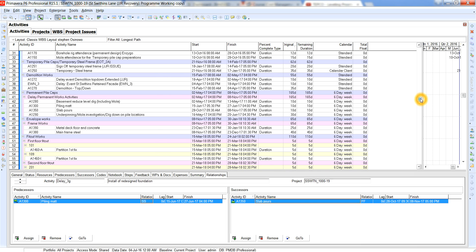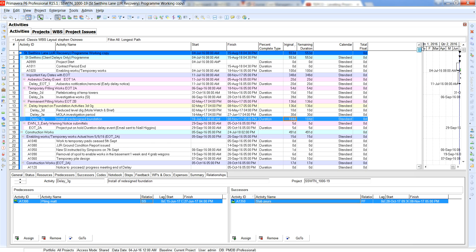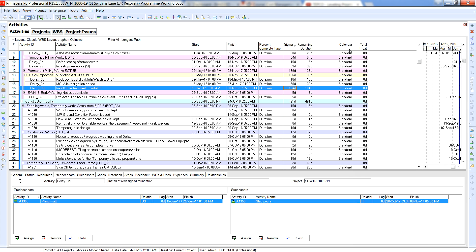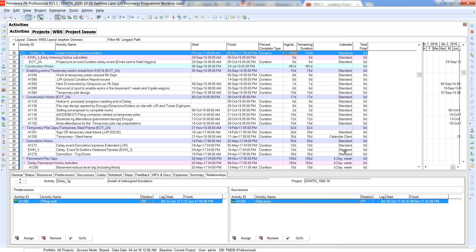And you close that and it gives you zero, so in essence it tells you all of these are critical activities, they fall on the longest path and the critical path, but it doesn't exactly tell the story. So with this if you hadn't pulled out your calendars you wouldn't know what type of calendars you have assigned to these activities.